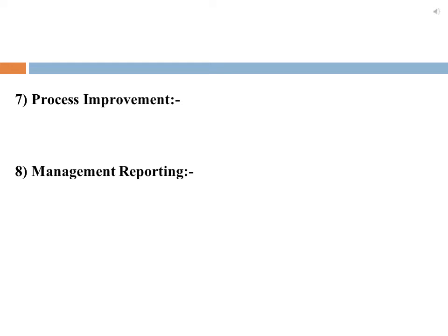Defect removal efficiency is also considered to be one of the most useful metrics, however, it cannot be calculated until the system is installed. The defect removal efficiency is the ratio of defects found prior to product operations divided by the number of defects found in the application.